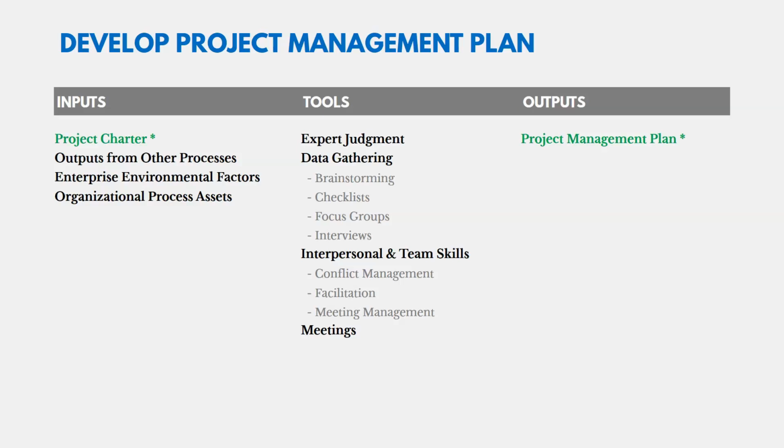The first thing that I think it's important to note is that a key input is going to be the project charter. This is an important concept. Oftentimes, not always, but oftentimes, outputs from previous processes become inputs to the next ones. So in Develop Project Charter, our output was the project charter, and it's going to be an input here. The project charter is going to be a key input as we put together our project management plan. And obviously the key output here is the project management plan.